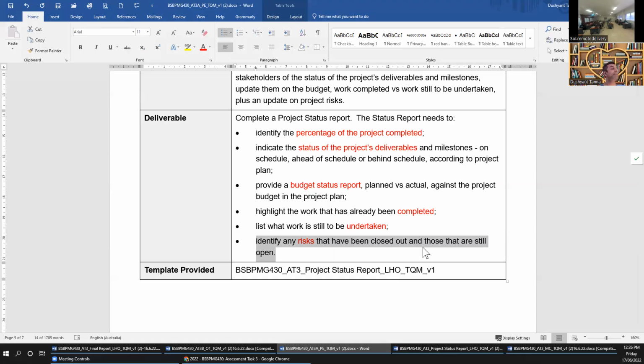The supplier gave you a quote of $30 and you said, no, $30 will make it $1,500. That's too over budget. If I spend $1,500 here, I'll have a lot of variation in my budget. So you requested the supplier to please give a discounted price, and he gave you $25, which fits within your budget category. So that was a risk, and you took care of it.